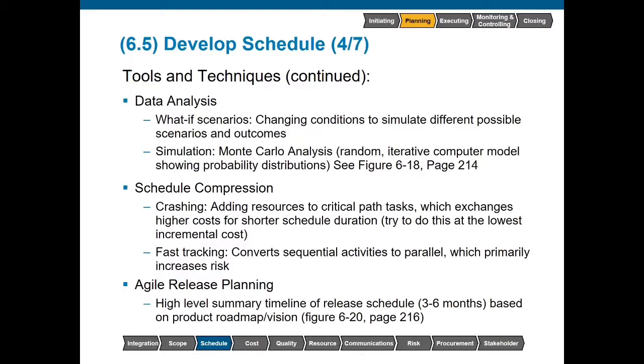With schedule compression, in some situations, we may need to go ahead and compress the schedule. Anytime we talk about compressing the schedule, if we are trying to shorten the project overall, well, we would have to shorten the critical path because the critical path is that longest duration sequence of activities and also the shortest amount of time to complete the project. We don't want to do this unless we really have to because it will have some type of impact on our project. The two techniques we're going to talk about do have various impacts that could occur to our project.